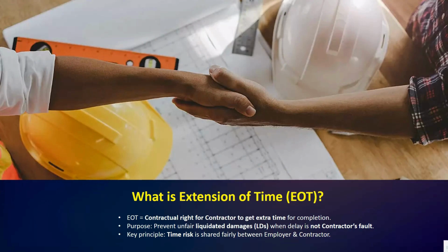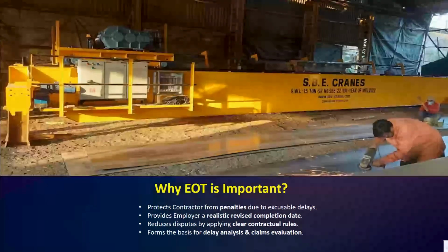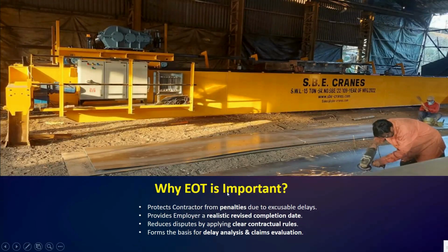So whenever a delay happens, the question is whose fault is it? If it is not the contractor's fault, so they should be given fair additional time through EOT. Okay. So next, now, why is the extension of time important? Okay, so here you can see I have added some major reasons here.